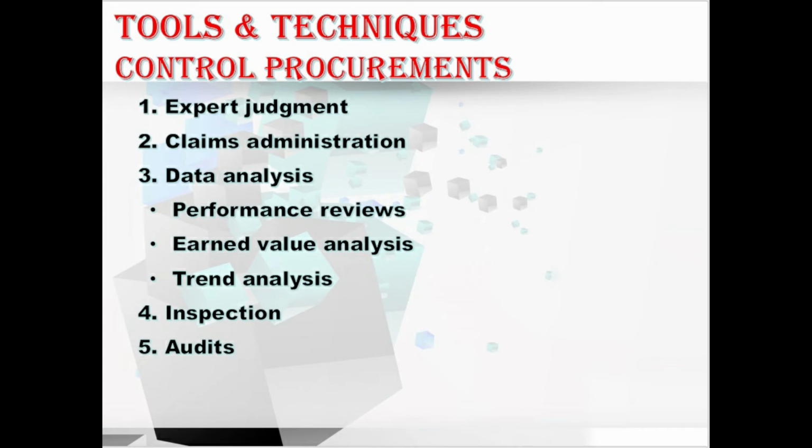Also, if the parties themselves do not resolve a claim, it may be handled in accordance with alternative dispute resolution, that is ADR, which typically follows procedures established in the contract. Hope you understood about this claims administration.